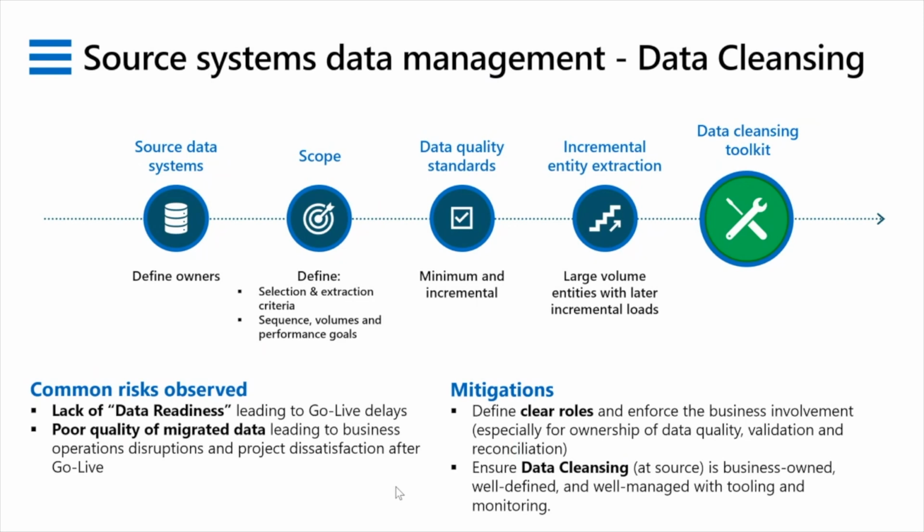One is making sure that the data cleansing at source is business owned. It's very well defined in terms of what do we mean by data cleansing, what is good enough quality, that it's well managed, and we as a project can provide them with some tooling and some monitoring to make sure that the data quality is something that you can actually assess and you can monitor the progress. You can track that the cleansing of the data in the source system is likely to complete within the time period that you need it to.